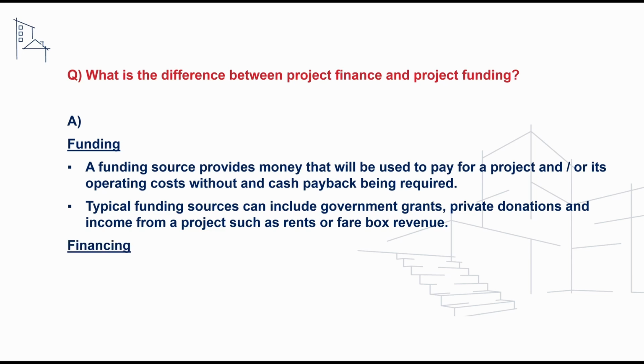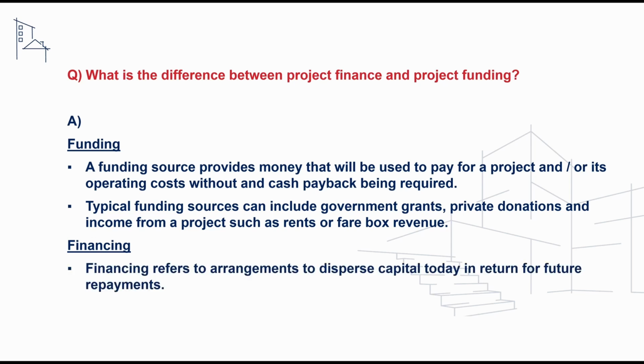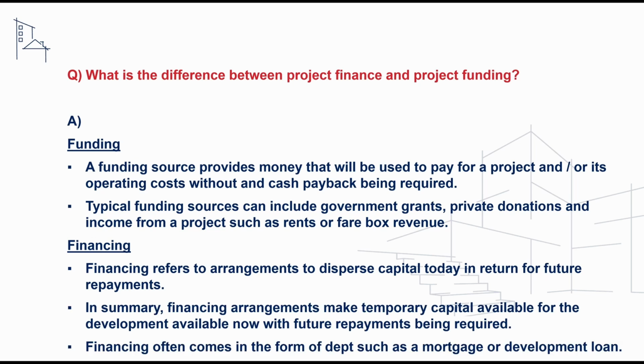whereas financing refers to arrangements to disperse capital today in return for future repayments. In summary, financing arrangements make temporary capital available for the development and make this available today, with future repayments being required. And financing often comes in the form of debt such as a mortgage or development loan.